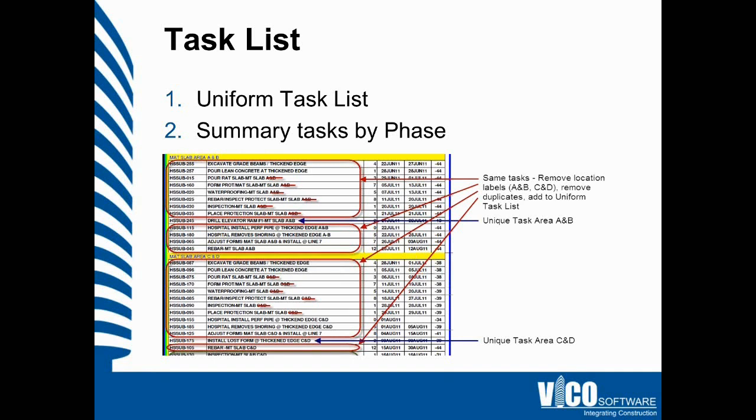So when you break the model into individual locations for planning and tracking your work according to your location breakdown structure, those quantities will already be represented in the proper locations in your schedule, in Schedule Planner. Also, quantities which may not have been identified in or represented in the CPM schedule are available, which gives you the opportunity to use or ignore those as needed.